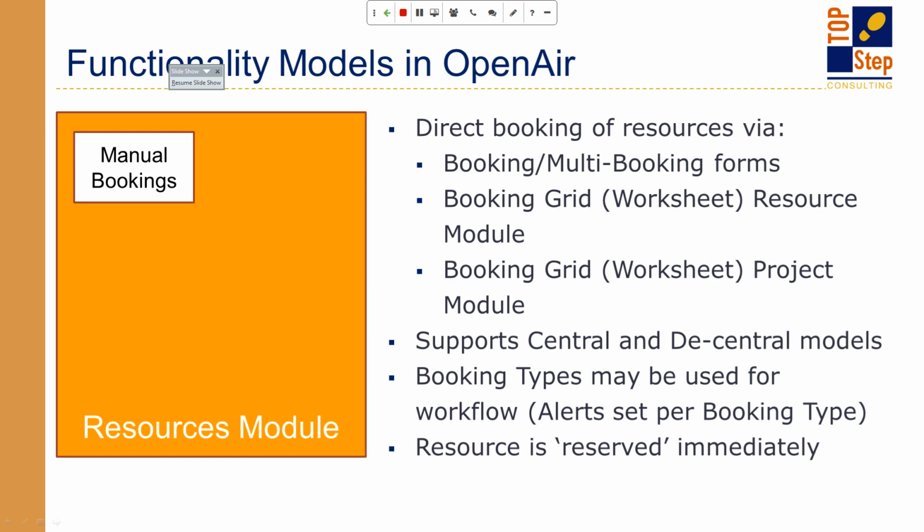It's the thing that you create to show which user is going to be working on something, when they're going to work on it, for how long they're going to work on it, and which specific project or task, which we'll talk about later, they're going to be working on. Essentially, the booking is your scheduling of the resources. There are several options for creating bookings, but the concept is essentially the same.